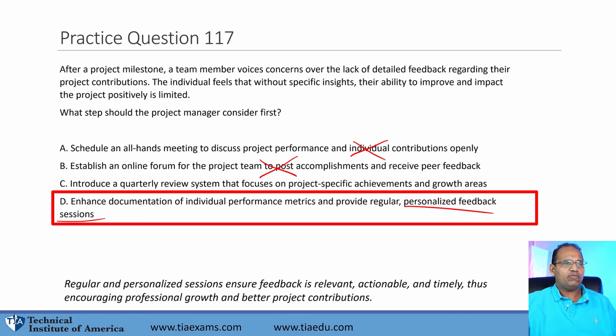You don't want just an online forum. You want to address this directly with the team member. A quarterly system may be too long or too short, depending on the project. The best thing here, let people know what those individual metrics are so they know if they're meeting them. And you want regular personalized feedback on this, making D the best answer.